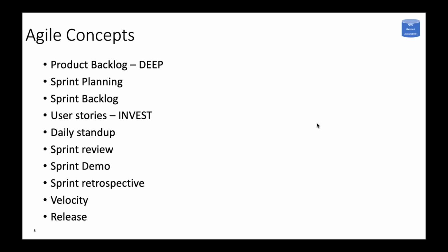Remember, in this one, there will be no debate or discussion. If someone has not worked on anything towards the sprint goal, they remain silent. And it is the duty of the Scrum Master or the person who is facilitating the daily stand-up to create the list of items, which we call parking lot items, which require detailed discussion or a separate meeting.